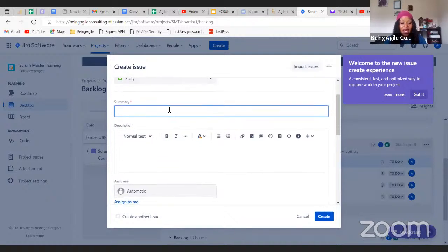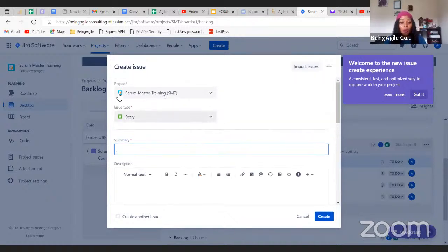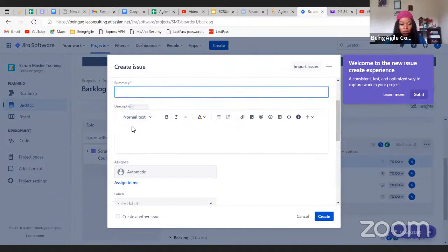So this is your template, and what will prompt me to know if the PO says it's detailed enough? I have my key things that I'm looking for. If the PO tells me that the user story is detailed enough, and then I come to the description, I don't see any description, I see this field blank, that's already a cue for me. And then the acceptance criteria field, which I told you all is missing here because it's a free version. Those are the key information that you want available for the team. If I see the acceptance criteria field blank as well, it's already a cue.